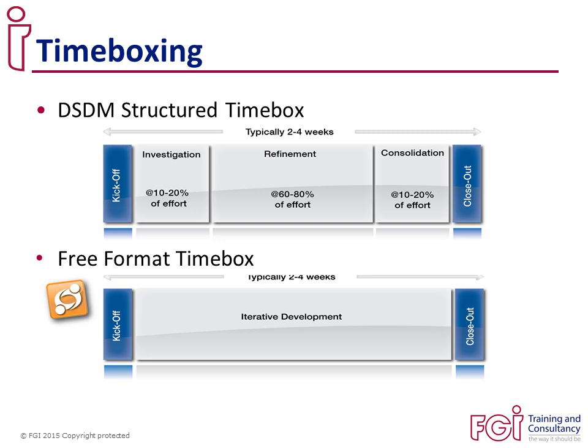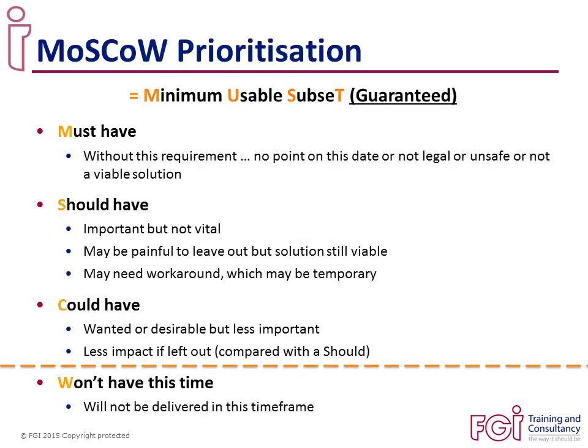These time boxes then will always deliver on time, and any non-deliverables, because don't forget we have feature flexibility within Agile, are added to the backlog for the next time box, which is again prioritised for its delivery. So prioritisation then is key to an Agile project. This is achieved using a technique known as MoSCoW.